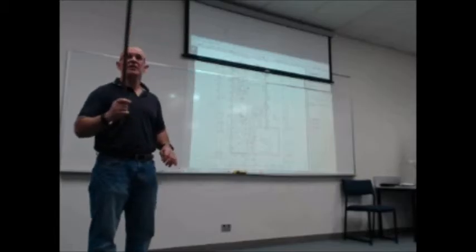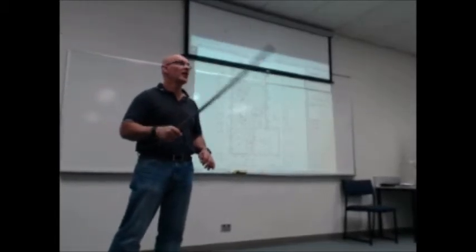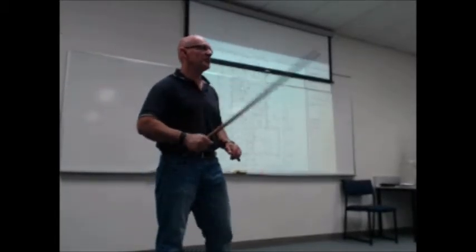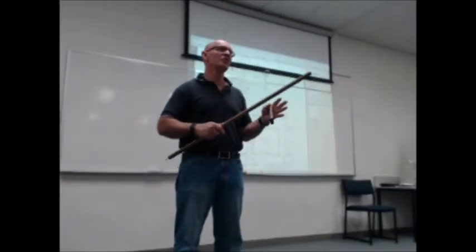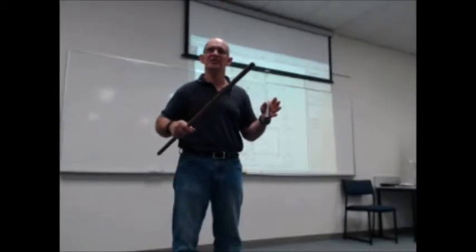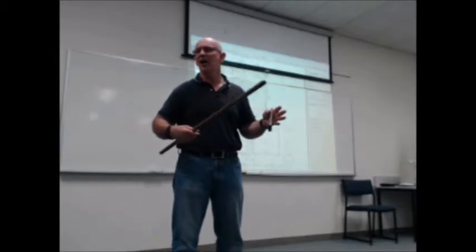Cleaning, site clean. What about cabinetry? Cabinetry is always going to be a quote or a provisional sum. You can work to a linear meter price, but it's not accurate. Well, they've given us different prices for different items. They've given you a full brand new kitchen for $700. Kitchen cupboards, 520. What does that mean? Full kitchen, $780.